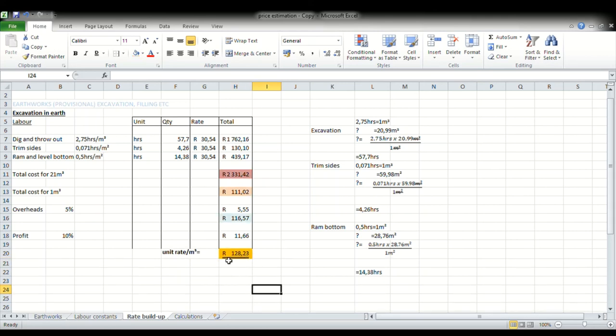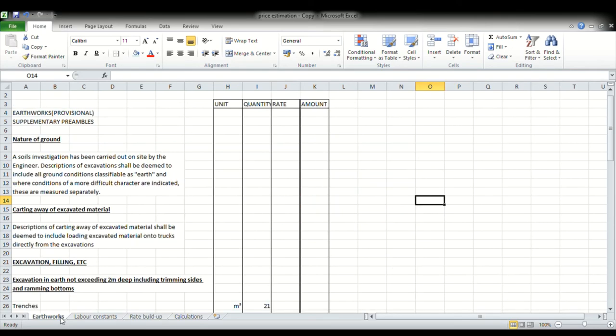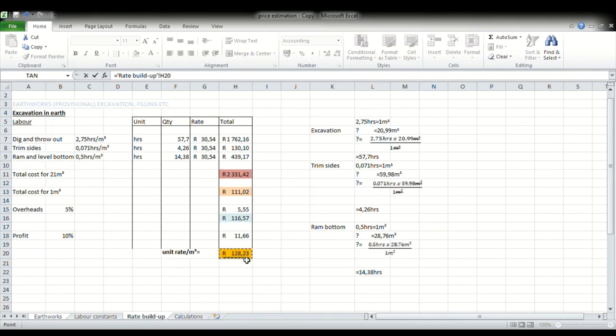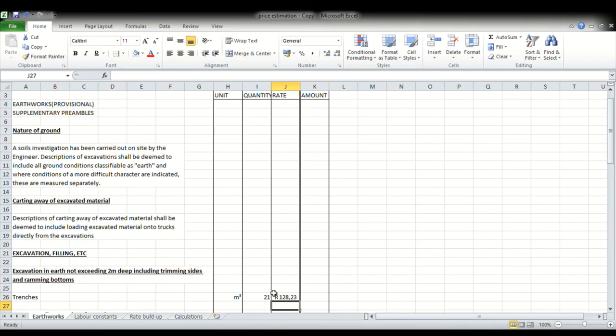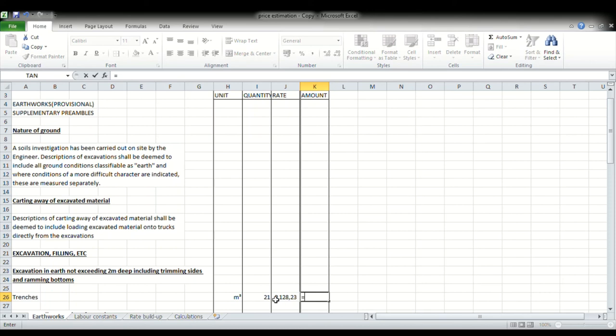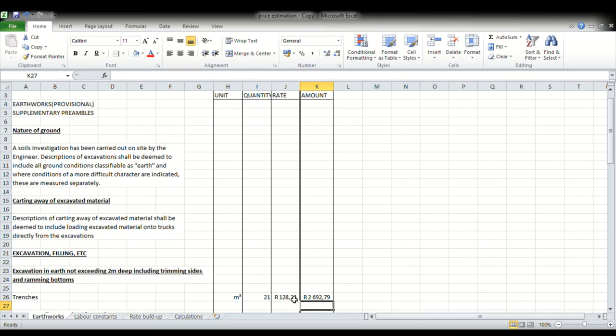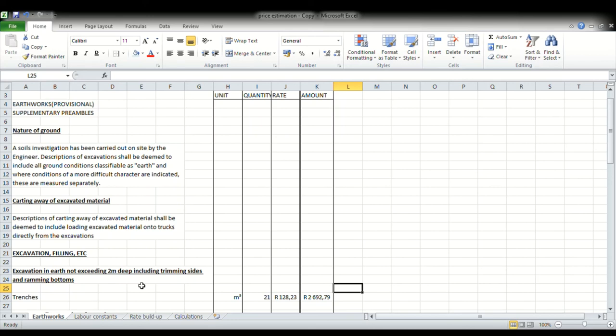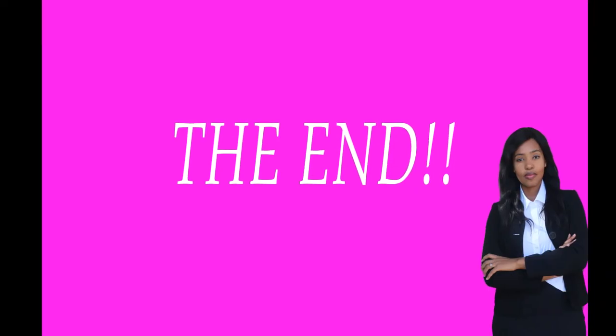So we take that unit rate, we go to our earthworks, and then we place it next to our trenches. And then to get the amount, we would go 21 times that, which is equal to 2,692.79. And that, ladies and gentlemen, is how you go about working out the unit rate for the item excavation in earth, in pickable material. Now if you want more exercises on this type of work, please do mention, and if you don't understand something, do leave your questions in the comment section, and I will try to get back to you as soon as I'm able to. If you liked and enjoyed the video and learned something, give it a thumbs up, and if you didn't, then do indicate. Have a great day. Thank you.